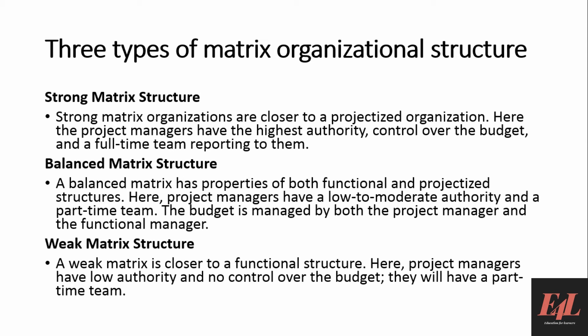In a balanced matrix structure, properties of both functional and projectized structures are combined. Here project managers have low to moderate authority and a part-time team. The budget is managed by both the project manager and the functional manager.